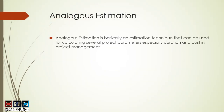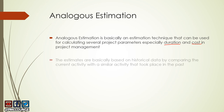Analogous estimation is basically an estimation technique that can be used for calculating several project parameters, especially duration and cost. This is where in project management the technique is used most. The estimates are based on historical data by comparing the current activity with a similar activity that took place in the past, and then you come up with an estimate of how much time or cost it will take.